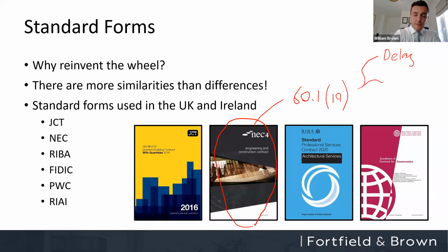It has to not have been allowed for by either party. So neither party could prevent. And lastly, the reasonable contractor, or the experienced contractor, to use the NEC phrase, would not have allowed for it at the contract date. All of those boxes have to be ticked off.